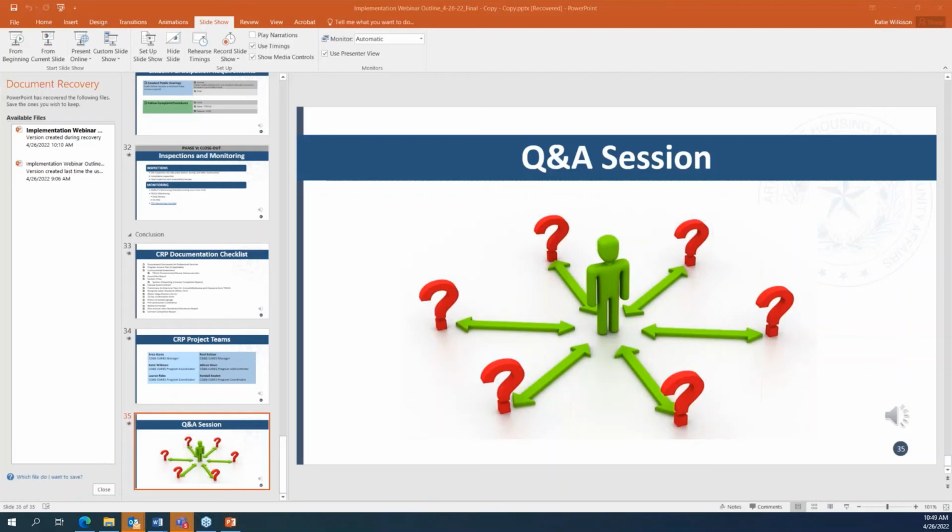The next question that did come up was about when we will be issuing the contracts. The contracts have to clear an environmental review. So once we get verification of the environmental review, we have finalized the budgets with you guys. And in most cases we have, but it's just the lingering environmental review. Once that's cleared, then we can execute a contract.